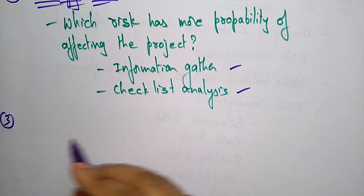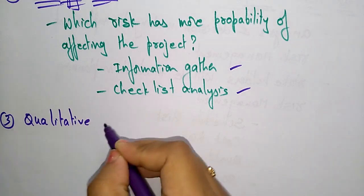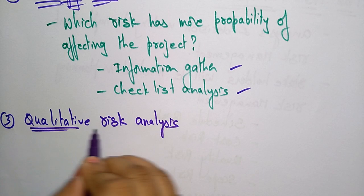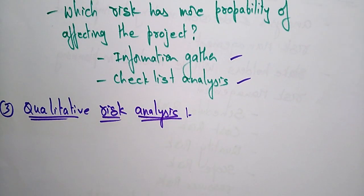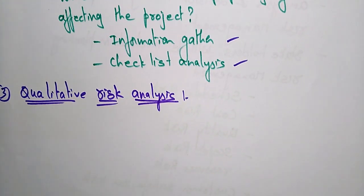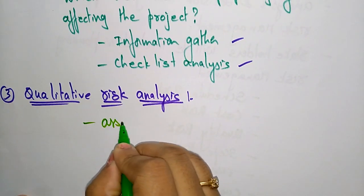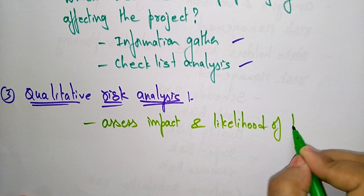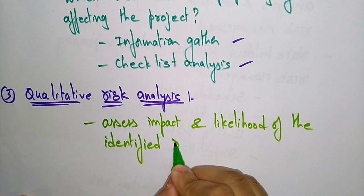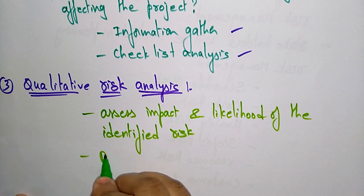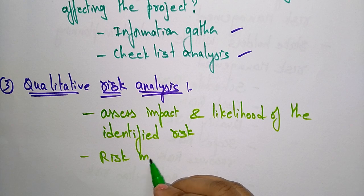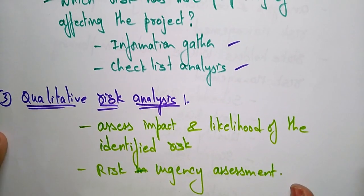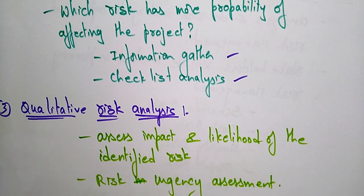The third process is Qualitative Risk Analysis. Qualitative means assessing quality — when developing a quality product, some risks may also be present. Qualitative risk analysis involves assessing the impact and likelihood of the identified risks, followed by a risk urgency assessment.